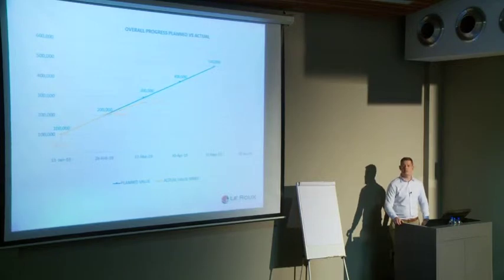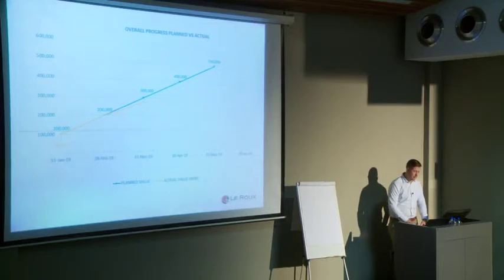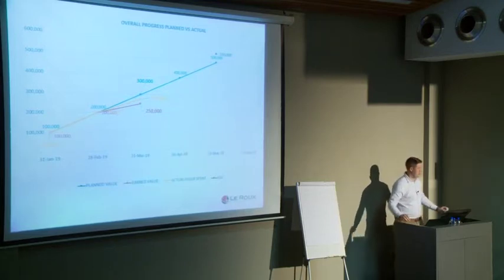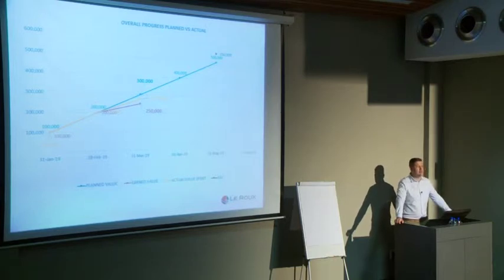Where's the accountants? What would an accountant think when they see this? They would think there's a saving, agree? And they would think that this forecast will lead to a saving right at the end, because we are now below what we plan to be. But as a project management professional, you guys would agree that this isn't really helpful. What do we need? We need that earned value metric. And what changes now from this previous picture? Why is it a loss?